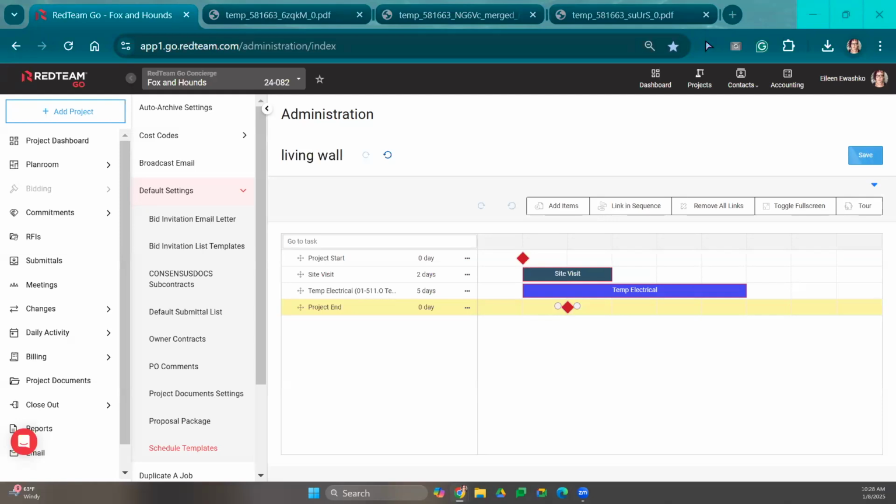Oh, but I'm sorry. So that answered your question on editing the subcontract template. That's a template, but I do want you to know that on a project-to-project basis, you are able to edit those subcontracts yourself. So if you do have a subcontract with a particular subcontractor and you need to change the wording on their subcontract agreement, you can do that just for that subcontractor once you've awarded it to them. Okay. And if that's something that you'd like me to show you, just let me know.